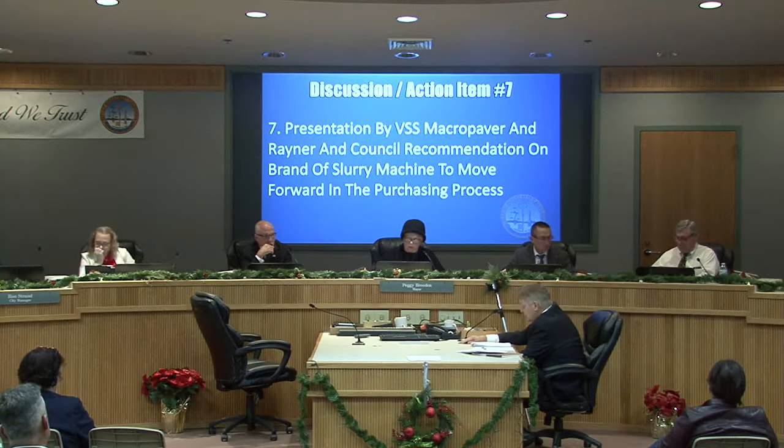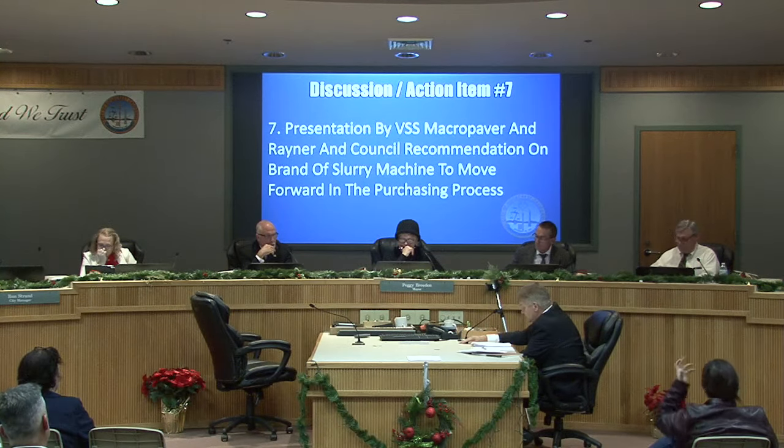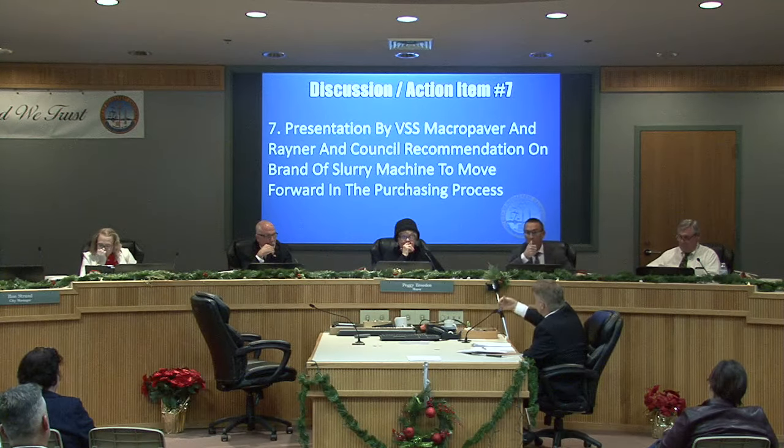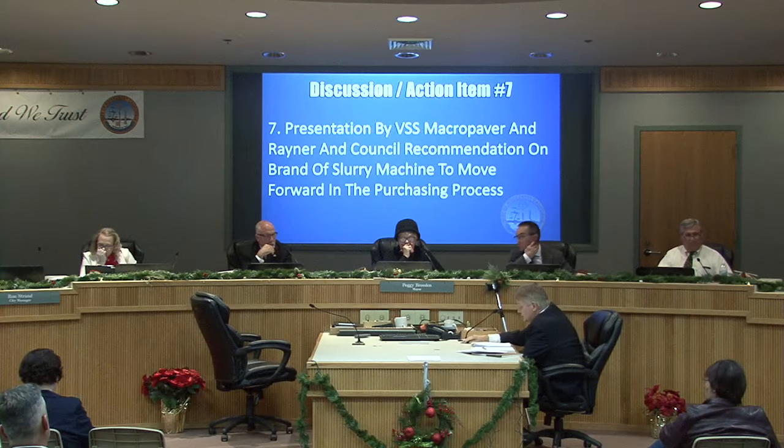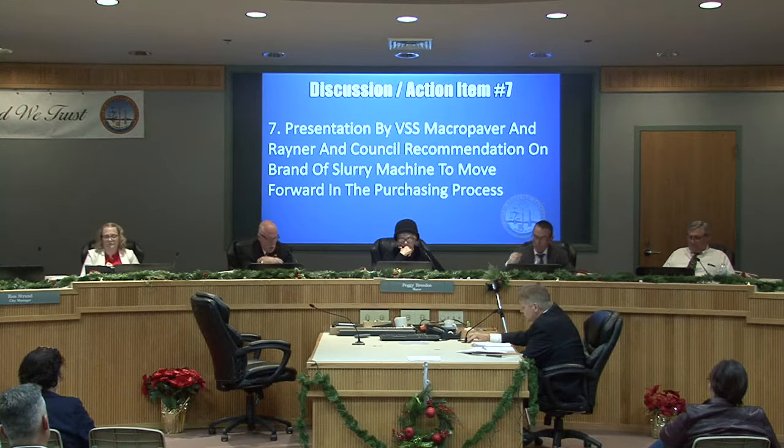The city required a cab-over truck design because of its efficiency in tight spaces such as cul-de-sacs. Because it doesn't have a nose, cab-over being the engine is under the driver and the front of the truck is flat, it's much easier for the driver to correctly place the truck during the slurry process. Also, the truck needed to be delivered no later than March 31st so that training could be completed and work could be commenced early in the season.